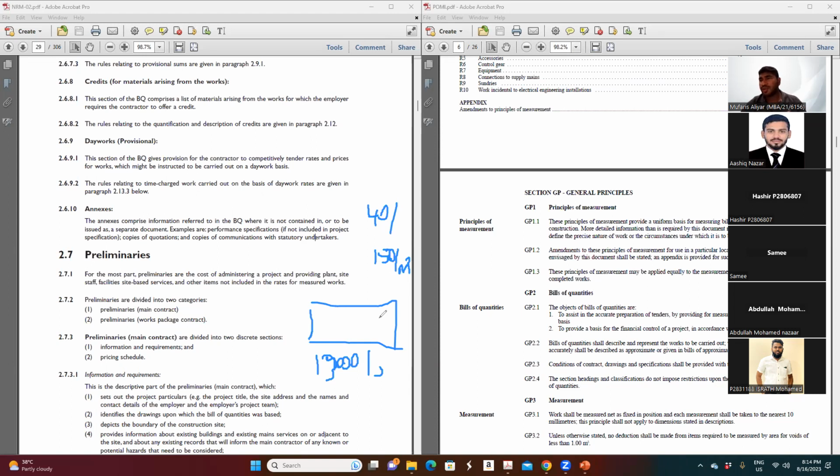So when I received quotations from 9 companies, I got surprised. Somebody put 200, somebody put 250, somebody mentioned 100 dirhams, somebody mentioned 180 dirhams. So we cannot control these people. So one option is you can go for a PC rate.